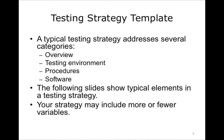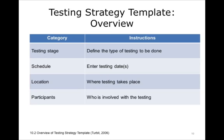Your strategy may include more or fewer variables. Typical elements to address the overall testing strategy include: the testing stage — define the type of testing to be done; schedule — enter testing date or range of dates; location — where testing takes place; and participants — who is involved with the testing.